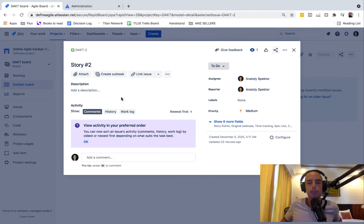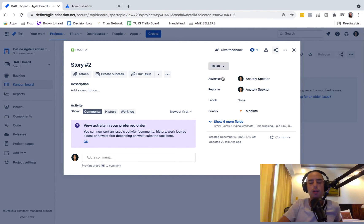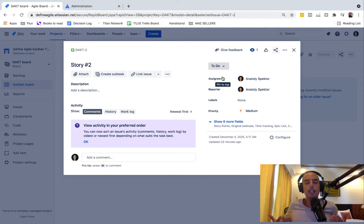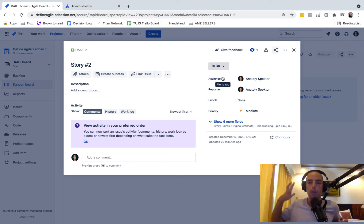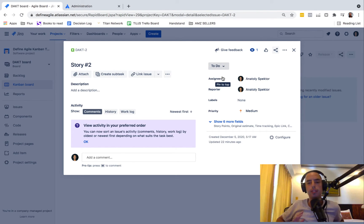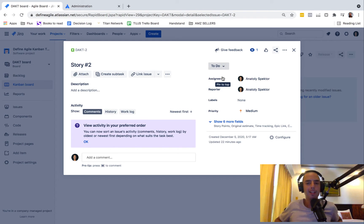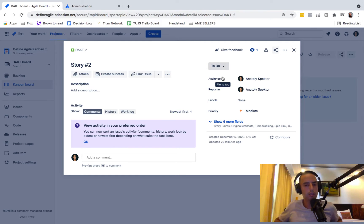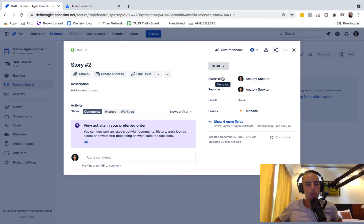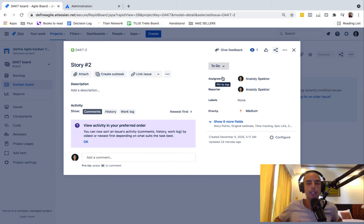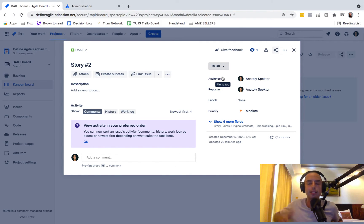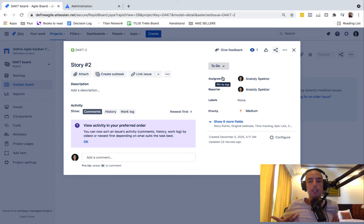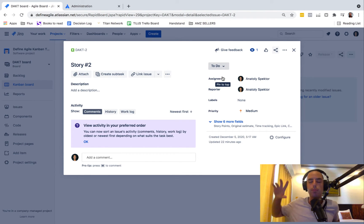Why do I say this is controversial? Because by default, Jira does not allow you to do that. Jira's design is one point of responsibility. So if something's assigned to multiple people, they might be saying 'oh Anatoly should do it, no John should do it' and then nobody will do it. So Jira by design only has one assignee, and I believe that's a good idea. But I have lots of POs that are messaging me saying 'Anatoly, we still need to notify multiple people. They want to see who else is responsible,' etc.